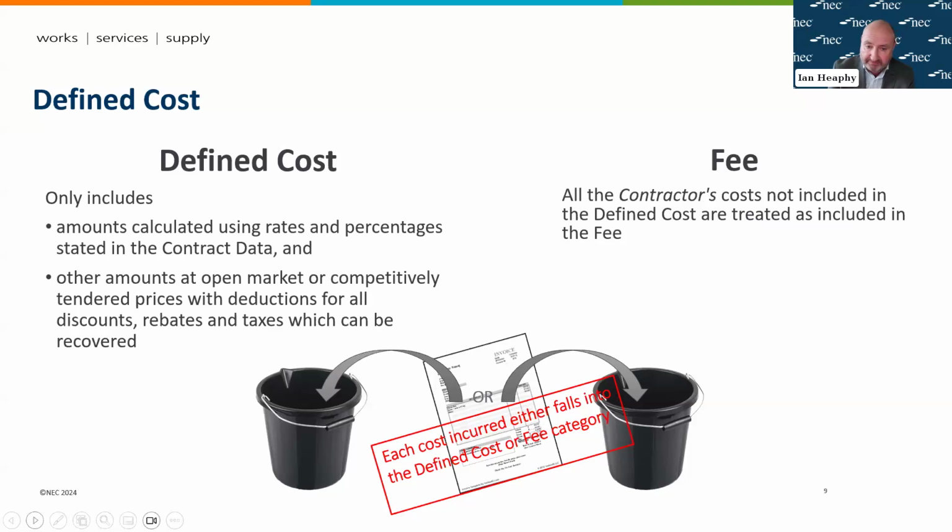And one way to demonstrate value for money is to go through some sort of competitive tendering process to actually show that you've been out to the market, you've got 3 maybe competitive bids, you've selected the one that represents best value, not necessarily lowest cost, because there could be factors around quality, availability, etc., that you also consider.